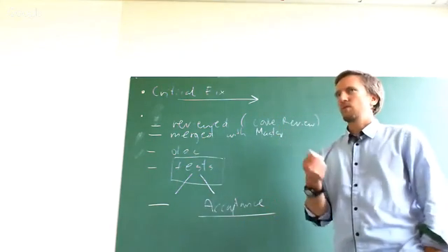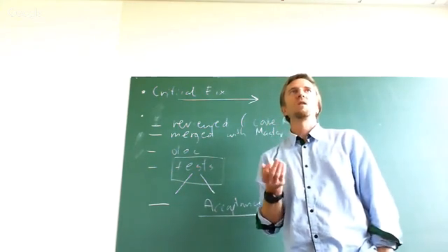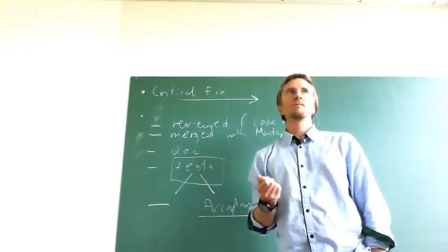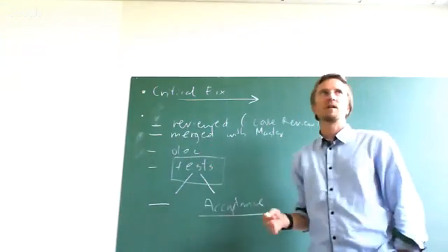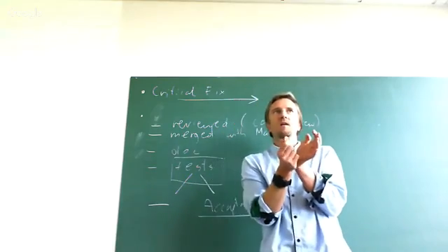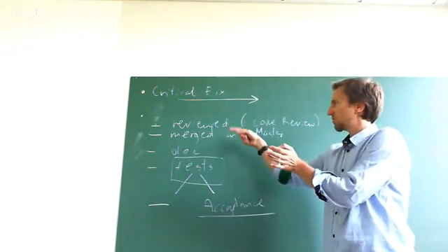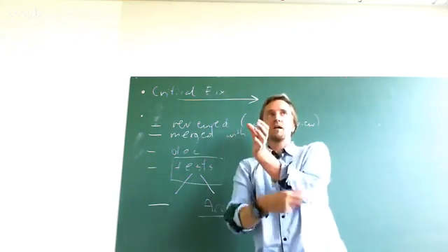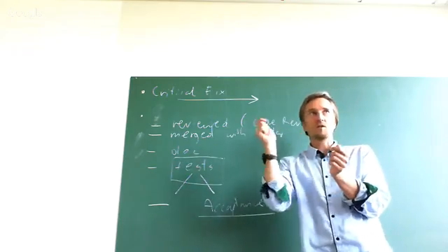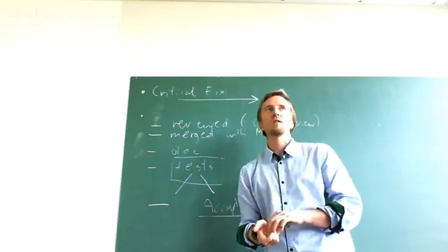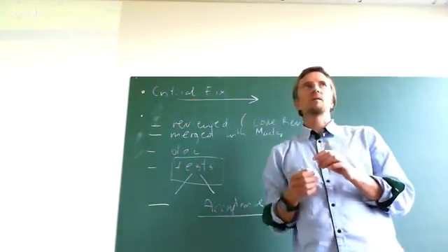Okay, so what you should do is sit with your team and define effectively what it means to be done, and when you can close an issue, right? And that's what these workflows are about. The workflows are about ticking those things, right? So if you have in progress, then maybe it has to go to review, so somebody else checks the code. Maybe it has to be reviewed and run the tests. So it was reviewed and the tests were passing. Then it's merged. And then the documentation is ticked off. And then it says, okay, we can actually close it now, right? We passed through all those checks that we require for something to be done. And then we can tick it off, right?